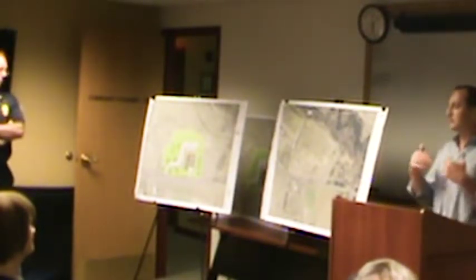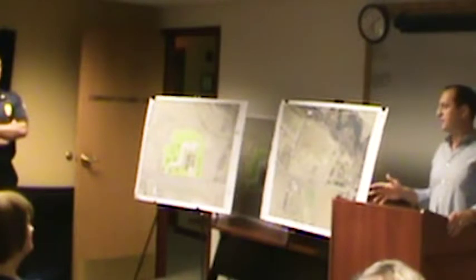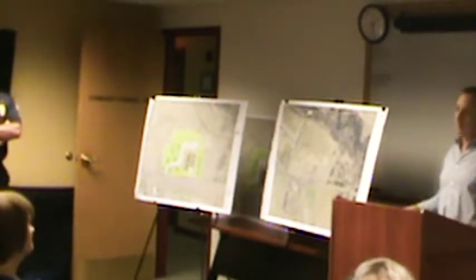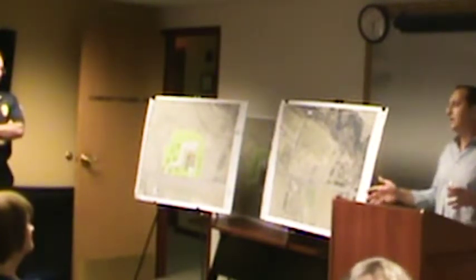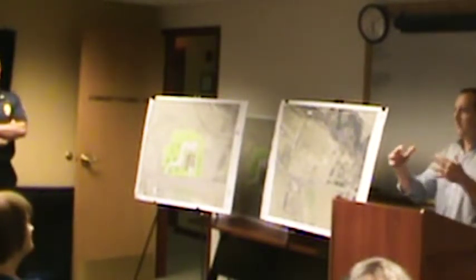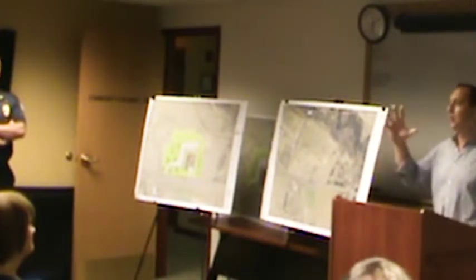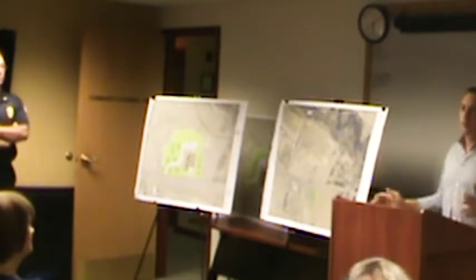For a project site location update, when we started this project, the project site was going to be 239 River Drive, the property of the North Hadley Village Hall. The plan was the building was going to be built on the ball field, to the left of the building, or to the north of it. That site has a lot of clay, so if we were to stay on that site, we'd have to do a preload scope where you excavate all the unsuitables within the building footprint, and you come in with new soil to a height of approximately 5 feet above grade, essentially building a mound to help create settlement and then start construction. That's an additional 200 to 300K.